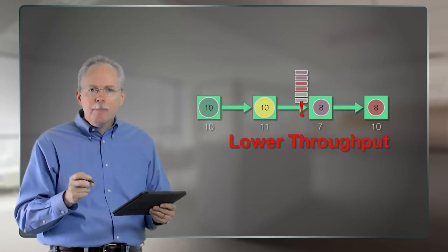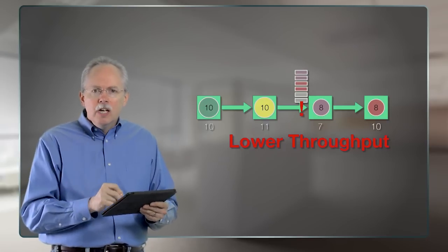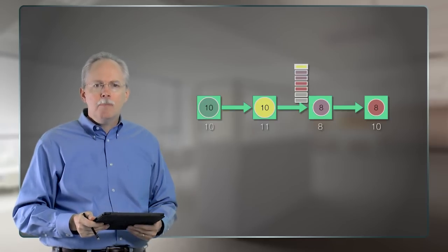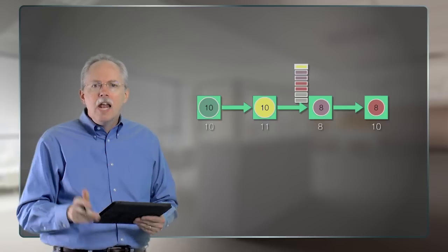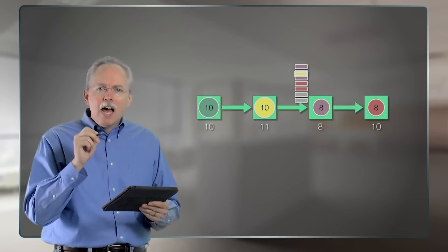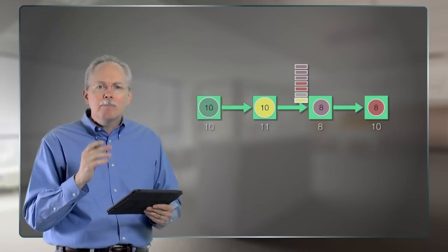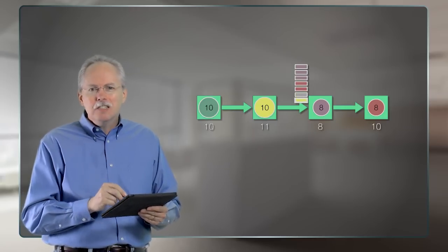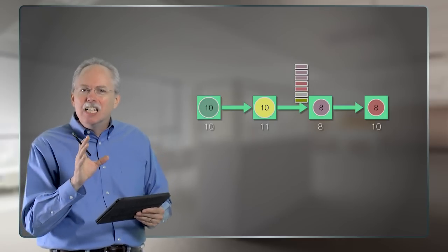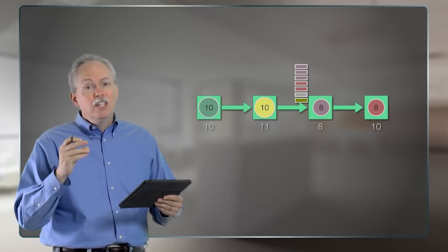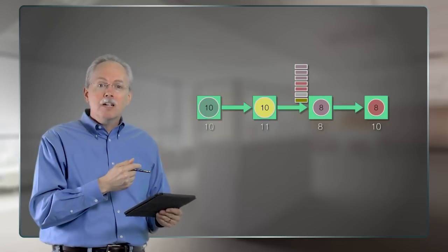The second thing that we see often is that we'll get a new item at the back, and it's fine. It's not a rush job. It'll wait its turn. And as it works its way down the queue, the world is changing around us. So by the time it gets to the bottom of this queue, it starts to go kind of moldy. It's kind of ugly looking, right? It's all kind of green and nasty. Well, that means we've got to go back and rework it through our entire process again.